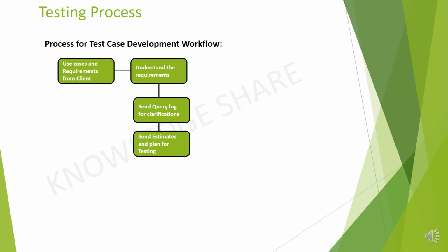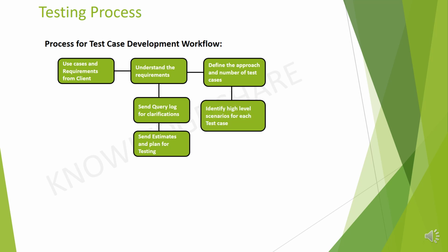Send estimates and plan for testing. Then define the approach and number of test cases. Identify high-level scenarios for each test case. Send the scenarios for review.